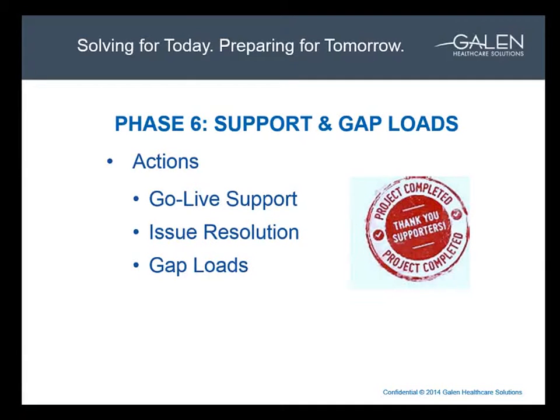At least one big consideration when working out the plan for the gap loading of data is how accessible the data is to the technical conversion team. In one of the conversion projects I'm working on presently, there's a tertiary vendor involved with the data extraction, and so this has a somewhat limiting effect on the gap load possibilities. Sometimes there might even be a fee involved for clients with multiple extracts. So that's yet one more thing that needs to be talked about, what's optimal for these data extractions and subsequent gap loads.